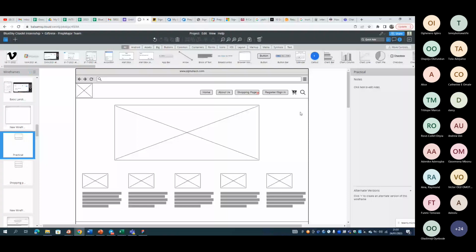Okay, now let's look at this landing page. This is the landing page. It has the header. It has the body. It has the footer. That is an epic. Now you go on to the features, okay? You say, okay, well, one of them is the header. You write the PBI for the header, all of them. They contain what you have in the header. Then you go on to what I'm saying.